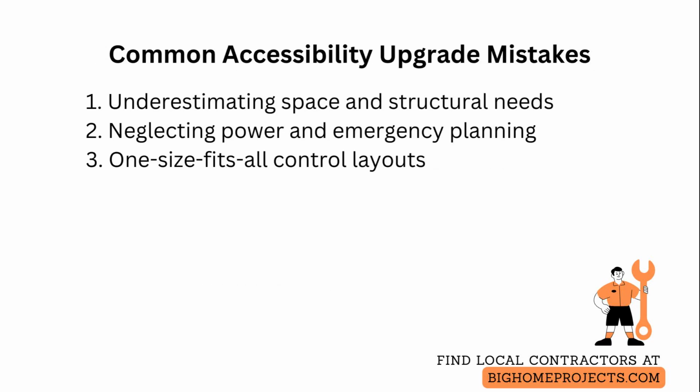Common mistakes include underestimating space and structural needs, which leads to expensive framing changes later, so confirm shaft dimensions and load-bearing requirements with an engineer before finishing walls.